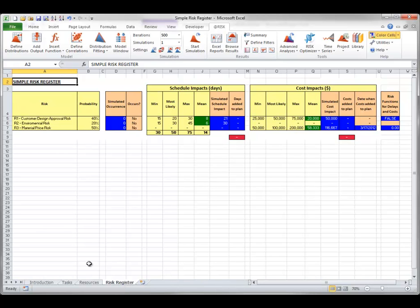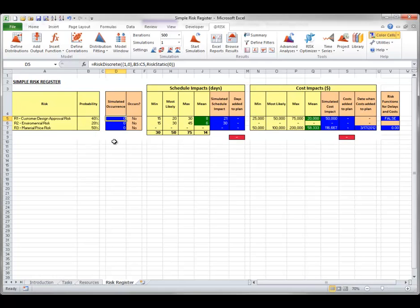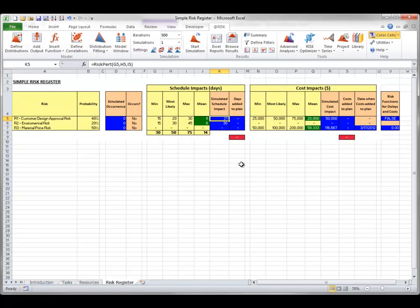The Probability column shows the probability of a given risk occurring. Risk discrete distributions entered in the Simulated Occurrence column use this probability to sample whether a risk occurs. If a risk does occur, it causes a Schedule Impact sampled from a Risk PERT distribution with Min, Most Likely, and Max values shown in the Schedule Impact columns. The risk can also have a Cost Impact sampled from a Risk triangular distribution with Min, Most Likely, and Max values shown in the Cost Impact columns. You can use any of At-Risk's distribution functions to model impacts in a risk register.